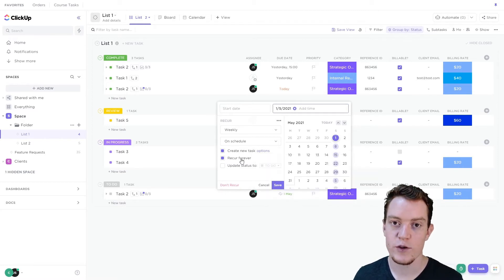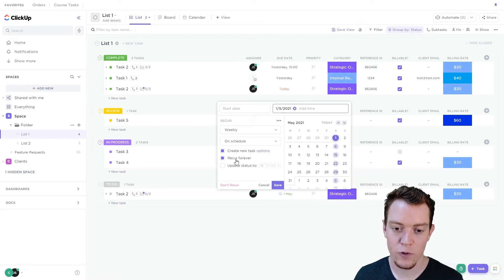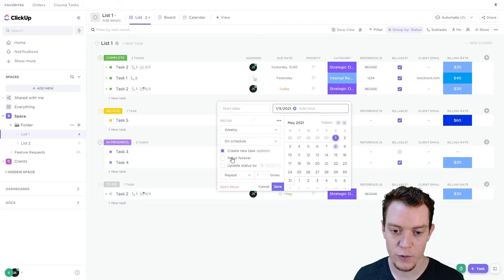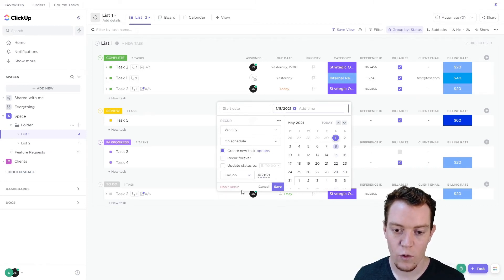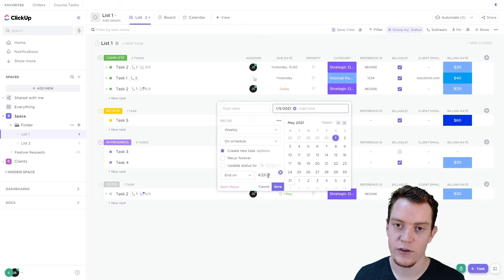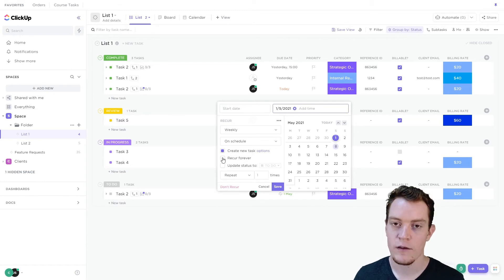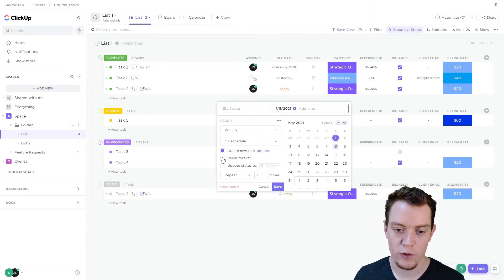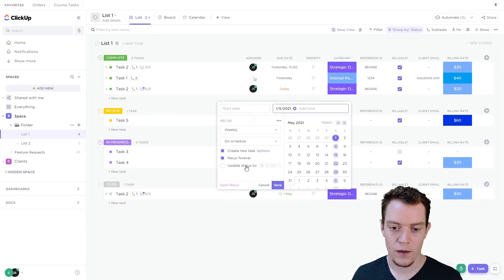We can choose how long this should happen for. By default it'll happen forever until we stop it, but we can also choose to do it a certain number of times or end on a certain date. For now I'll just leave it on 'recur forever.'